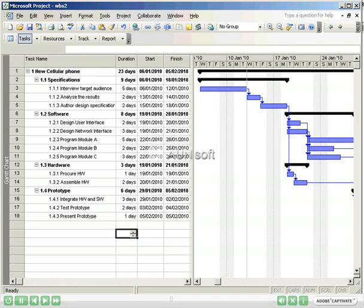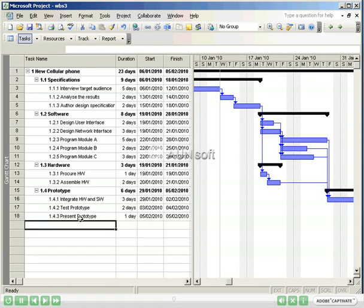We have now finished entering duration for all of our tasks. By entering predecessors and durations, Microsoft Project 2003 has determined the earliest start and end date for each task. This is appropriate for many tasks, but not for all.